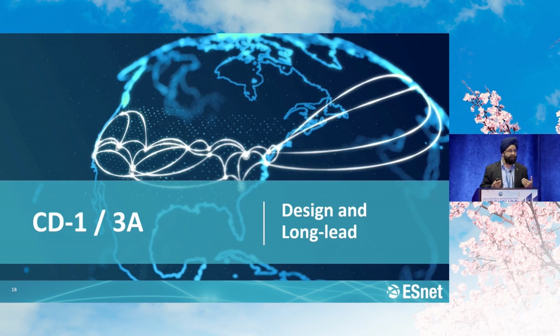So the next stage from CD0 is CD1/3A. Now you're going to say, you told us CD0, 1, 2, 3, why this 1 and 3A? While there is a framework, there is some flexibility in the framework. And what 3A means is you're starting a long lead execution. So you're getting CD1, which is approval of a cost range and an alternatives analysis, but at the same time, you're making a request to start something on the project early, because that's the longer critical path. CD3 is execution, so 3A means you're executing on a small piece of the project and starting on that early.